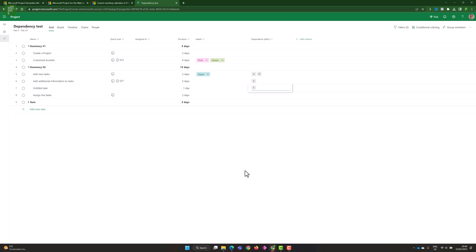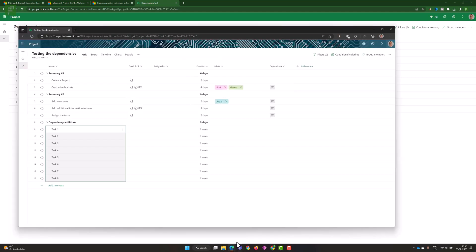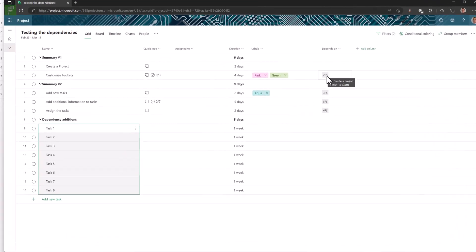Luckily, I have another tenant at my disposal that does have the new functionality. On my project environment, we do see the dependencies a little bit different — we now have the FS. And if I hover over it, it tells me that this is a finish to start dependency. This task can only start when the other task is finished, so task two needs to be finished before this task will start. That's how you should read this.